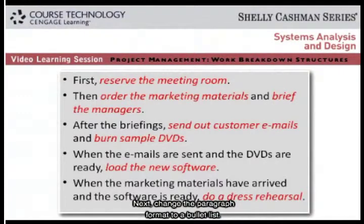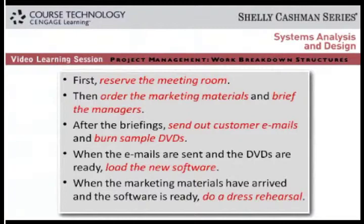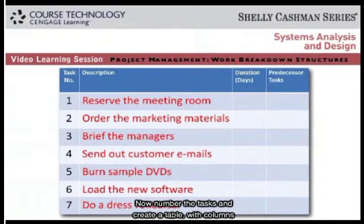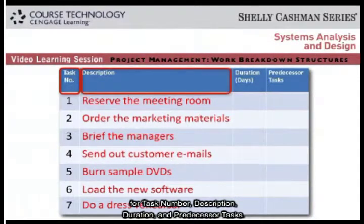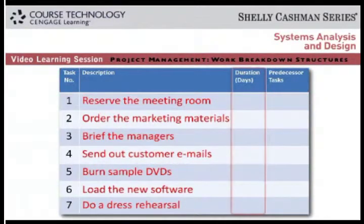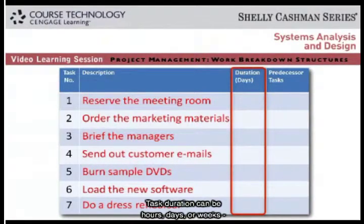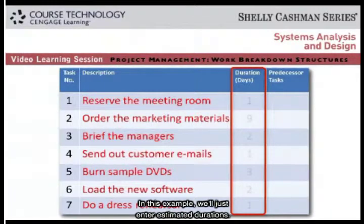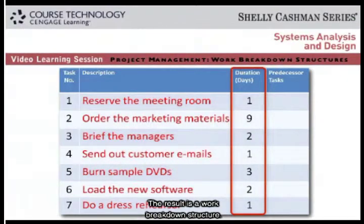Next, change the paragraph format to a bullet list. Now number the tasks and create a table with columns for task number, description, duration, and predecessor tasks. Task duration can be hours, days, or weeks, depending on the project. The textbook explains how to use a formula to make a best-case estimate for each task. In this example, we'll just enter estimated durations. The result is a work breakdown structure.